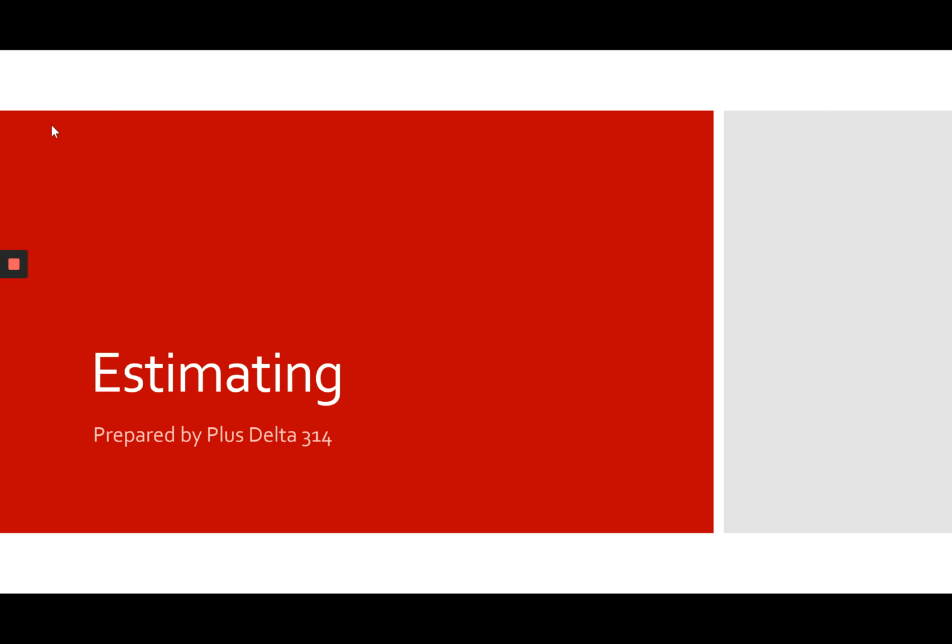One of the tools that I have implemented and I encourage you to consider as well is a risk estimating tool. This is really an Excel spreadsheet where I have gone through, and every time I've done a project and something has gone awry, I have added it to the risk description. There have been scenarios where people from a resourcing perspective have been assigned to multiple projects. Because of that, I did not have them available when I needed them on my project. And that created delays in the project.